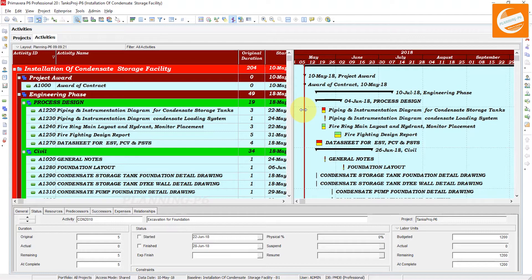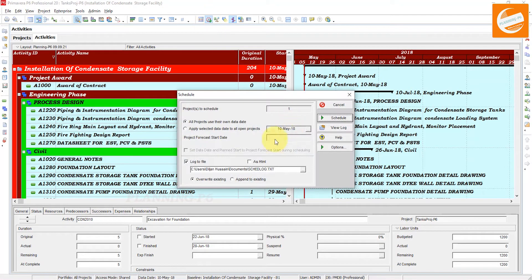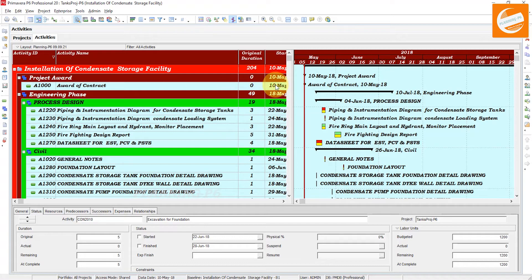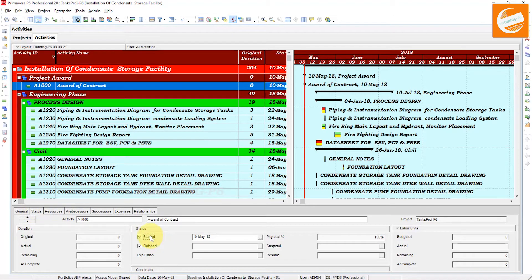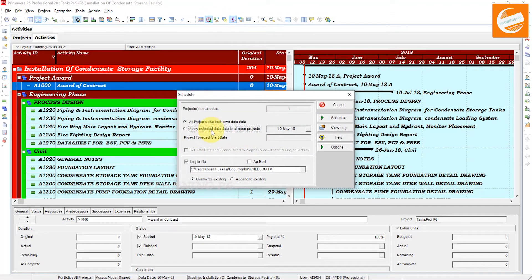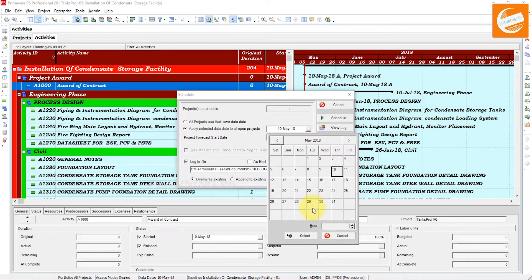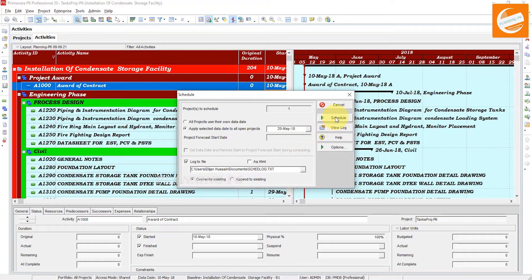Now show the progress line. This is our progress line. If I schedule my project — since this is not updated, it starts on 10th May. I complete one activity, and now I can schedule the project. Suppose I am scheduling on 20th of May — select it and schedule.